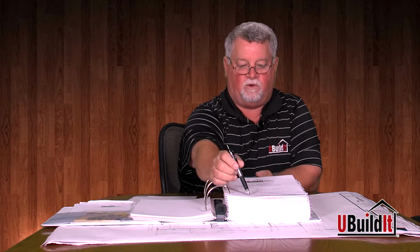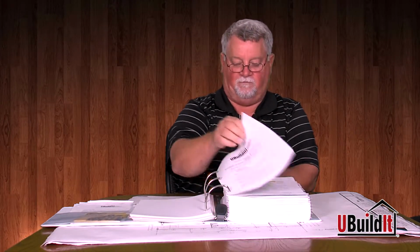Next thing it does is to order steel for the footings. It does not apply if your contractor has a turnkey bid. If it's a turnkey estimate, you won't need to worry about ordering the footing steel or any form material.